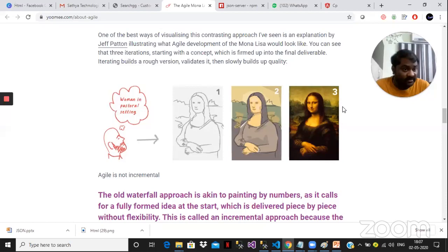But nowadays, what to do? First construct the pillars and slab, then complete the first floor, and the customers who purchase that first floor can occupy it. After completion of the first floor, start constructing the second floor: second floor wood work, electrical work, water work, tiles work, everything complete. After completion of the second floor, go to the third floor, something like that. Nowadays phases came in gated communities also: phase 1, phase 2, phase 3, phase 4. First complete phase 1 and then start phase 2, and so on. That is the agile model. The waterfall model is a sequential model.